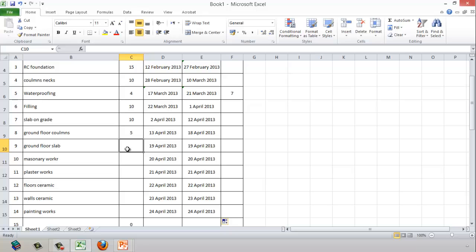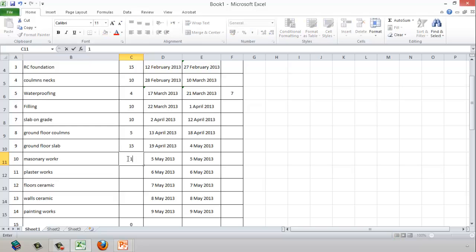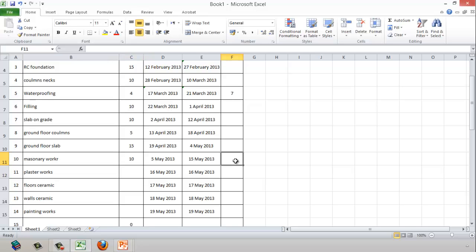If the ground floor slab takes 15 days, Excel automatically calculates the completion date as the start date plus the duration, and then provides the start date for the next activity. For masonry work, it will take 10 days, but we need a 14-day lag to allow the concrete to cure before starting.